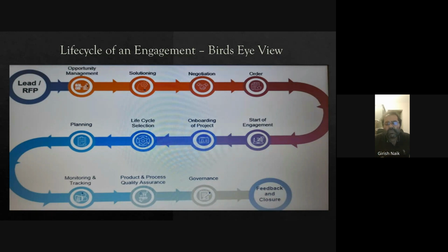How do you make sure these things are fixed? We call something like gating, right? For each phase, a gating review happens and we make sure, are we ready to go to the next phase? Is this product ready for delivery to the customer, right?